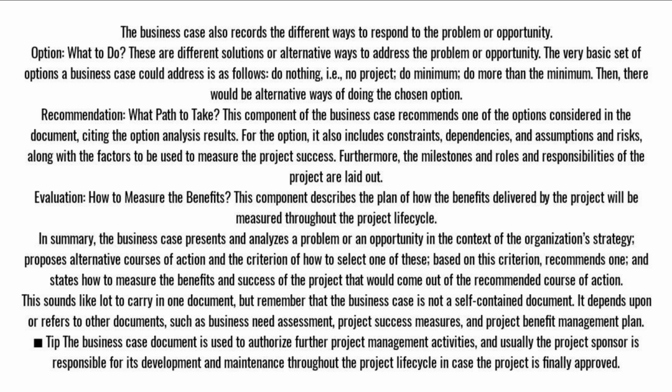This sounds like a lot to carry in one document, but remember that the business case is not a self-contained document. It depends upon or refers to other documents, such as business need assessment, project success measures, and project benefit management plan. Tip: the business case document is used to authorize further project management activities, and usually the project sponsor is responsible for its development and maintenance throughout the project lifecycle in case the project is finally approved.